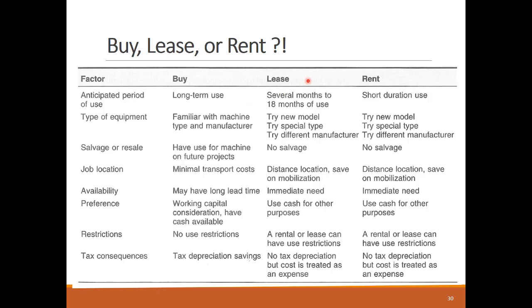Lease is the better option for equipment that are needed for shorter terms in remote projects with long distances from the construction company main territory, with immediate availability and low capital needs. Rent provides the same benefits of leasing at higher levels, much shorter terms, but at much higher cost rates.